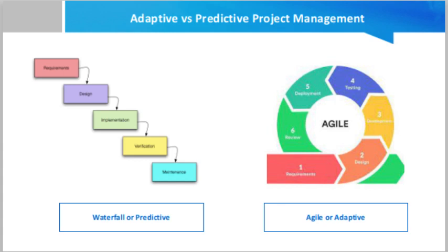In the adaptive model, teams work backward from the desired completion date. Every task is defined along with its worst possible completion date and then clubbed with other tasks with similar timelines into sprints. Dependencies between every task will not necessarily be mapped out. This allows a more flexible model, allowing for more room to adjust resources around and allows iterations due to innovation or scope change.